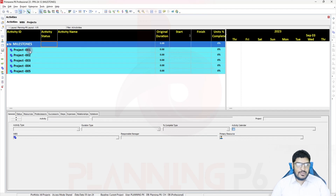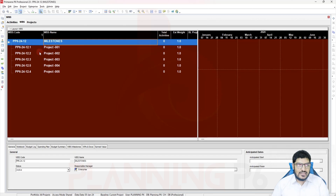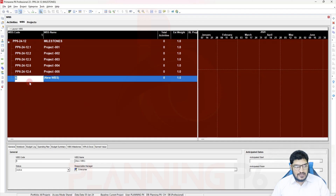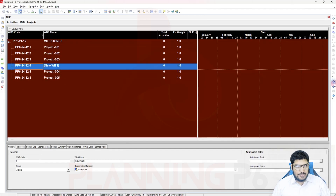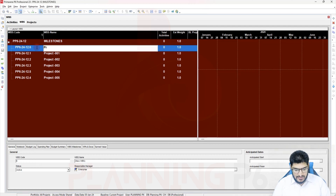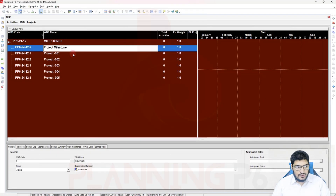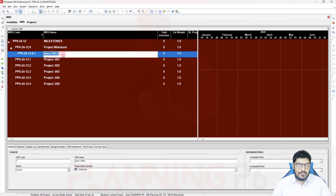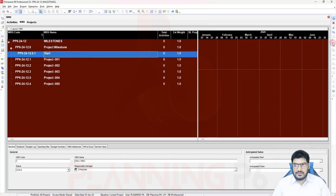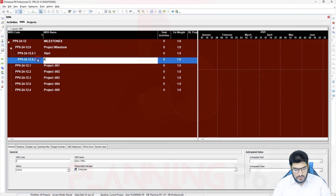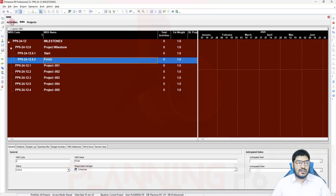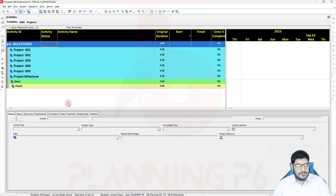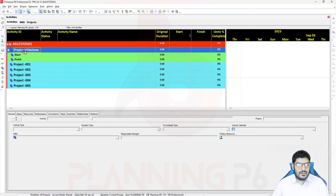Now we can add how to place start and finish milestones. We need to add another WBS specifically for milestones. I will add the WBS here, move it up, and name it 'Project Milestones' or 'Milestone' — whatever you prefer. Under the project milestone WBS you can add start and finish separately — Start Milestone and Finish Milestone. After refreshing you can see the milestone WBS with Start and Finish.